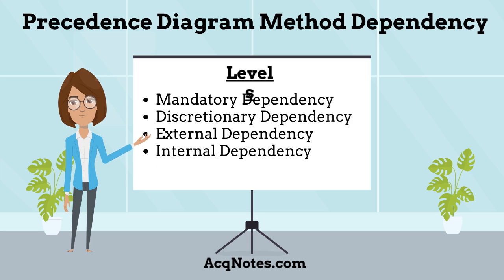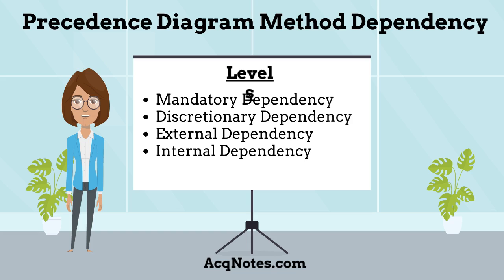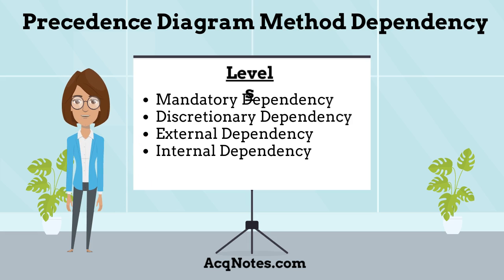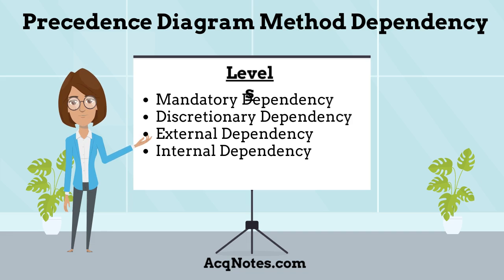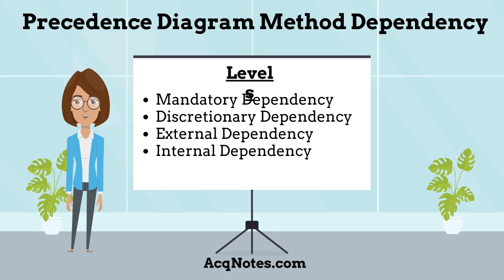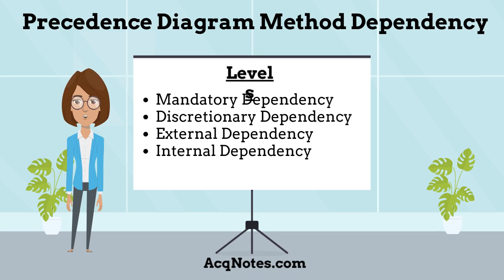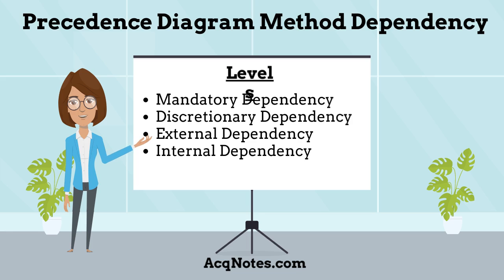The precedence diagram method has dependency levels which are: mandatory dependency, known as hard logic, is an integral part of the work — for example, activity A must be completed before activity B can start. Discretionary dependency, or preferential or soft logic — the dependency is controlled by the project team and can be changed. External dependency comes from outside of the project — for example, laws and regulations, or waiting for government funding to begin the project. And finally, internal dependency involves a precedence relationship between project activities — for example, it cannot start until the previous internal project is completed.